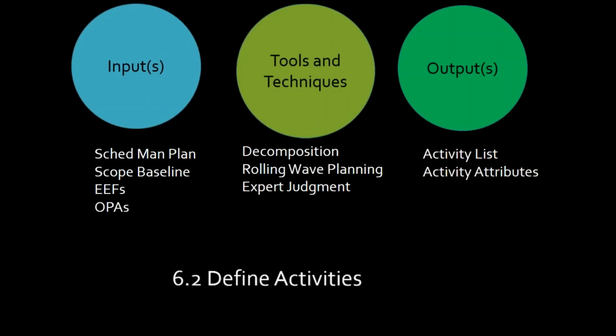We don't even know how well the first phase is going to go. So rolling wave is a good example: somewhere about 3/4 of the way through the first phase of a project, we start to now really get serious about planning the second, because now we have a better idea about when phase 1's going to be done, what's going to be delivered to phase 2, etc. Okay, we use rolling wave planning, and of course the expert judgment I was talking about.